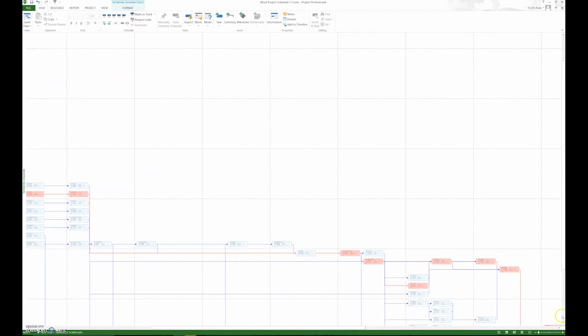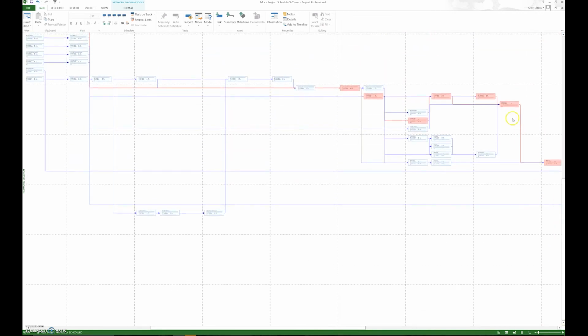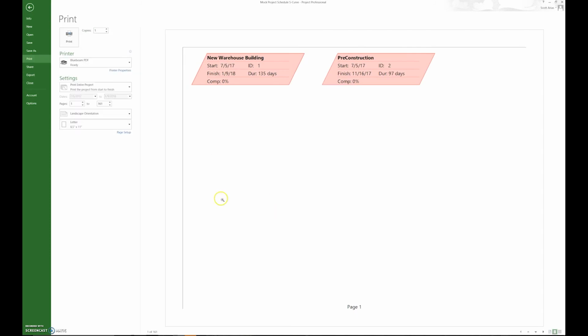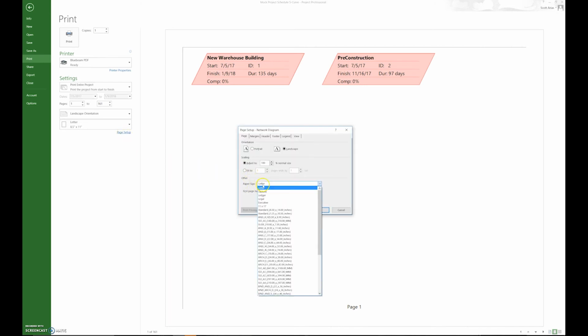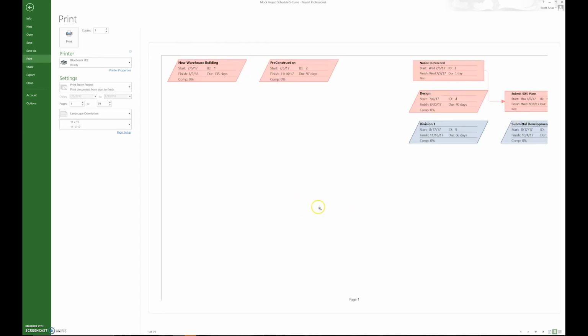So this is a real quick way, instead of looking at predecessors and successors as I previously have told you, you can also look here to make sure there's a line going in and a line going out. So it's just a graphical way, and sometimes people will want to see this report. You can go File, Print. Now the problem is that this is such a large diagram that unless you plot it on a very large E style, 34 by 44 inches, it can be very difficult to get everything in here.